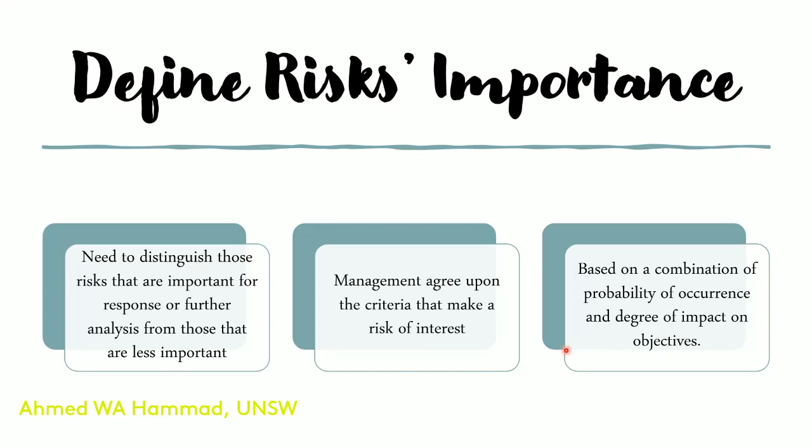Now remember, the organization can be involved in several projects, so a construction organization will have to look at the commercial, residential, and infrastructure projects that it is involved in, and then decide upon a suitable scale for its probability of occurrence and for the degree of impact on objectives that would be defined across the projects that it would be involved in.